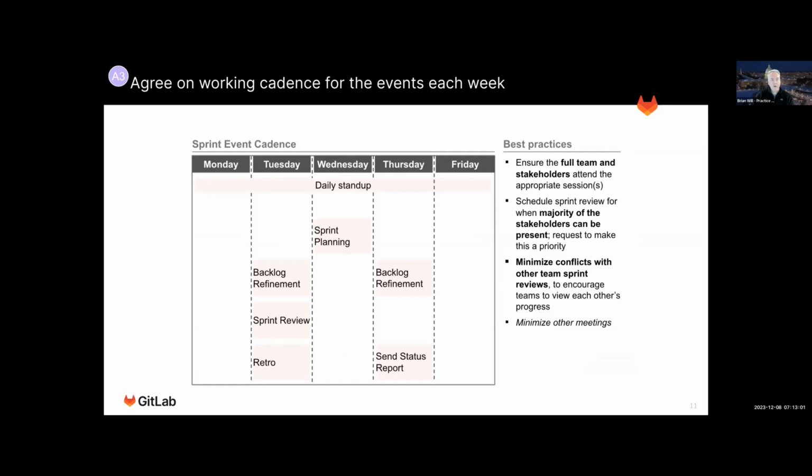What I want to stress though is that all agile process models and methodologies assume that you go through some kind of cadence. So for example, a sprint could be 1 week long, it could be 2 weeks long, in some cases even 4 weeks long, depending on your environment and the technical challenges you're trying to solve. The cadence is important because it also establishes a feedback model for when things aren't going well or you need to adjust. And that's what the retrospectives are usually there for as well, so that you can iterate.